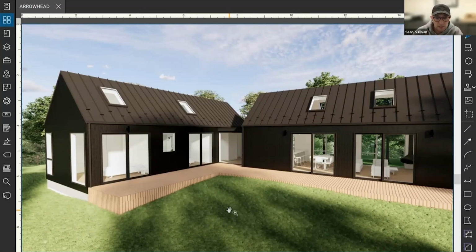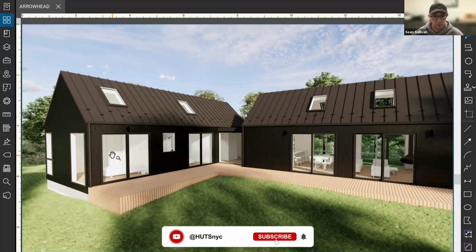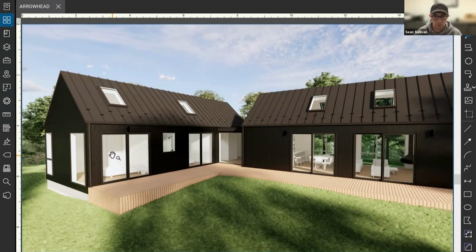Instead, we were working through the fact that, for example, the window and door package came in a little bit high. So we were starting to evaluate keeping the look, but looking at different companies. So we didn't take anything away, but rather looked at other options to see how we can still fit in the budget and still match the aesthetic that they're looking for.